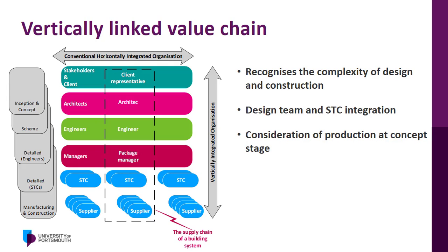Technology clusters approach addresses this vertical development of building components by breaking the team and reorganizing them around the interfaces in building systems and elements. In a technology cluster, focusing the attention of the team on a building component, the client briefs the designers, the designers produce the design, the package managers facilitate the transfer of the design information to the STCs, and finally the STCs detail these components, manufacture them, supply them, and install them.